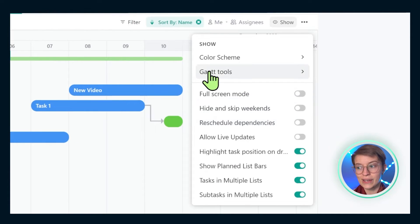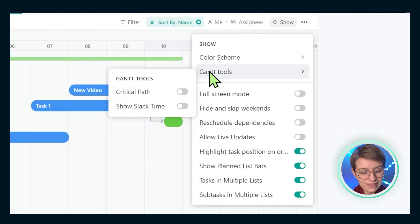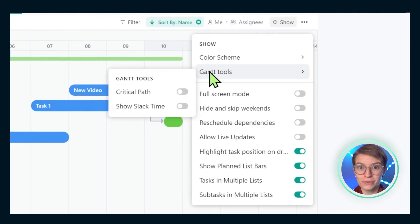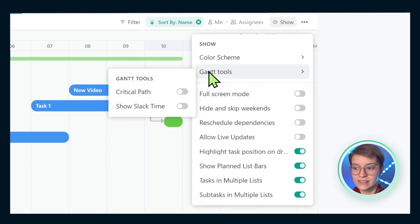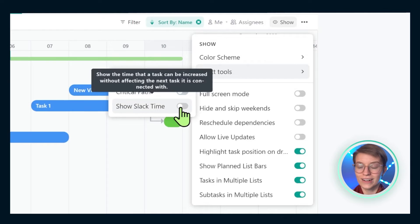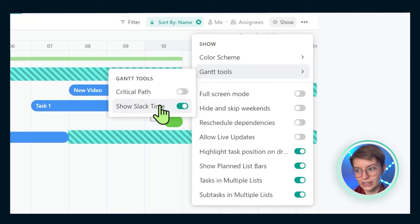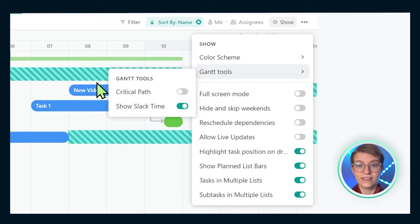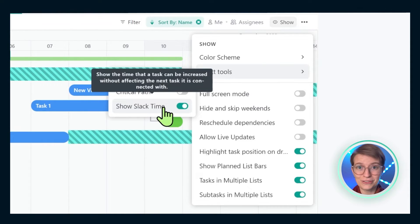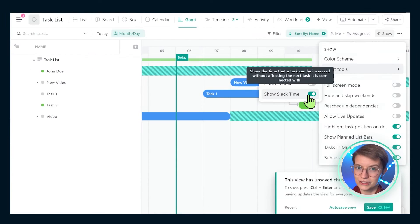In addition, we also have Gantt tools inside the Gantt view. While this is nowhere close to MS Project or other Gantt-heavy software, this does allow us to see things like critical path — the path to achieve a result, what we need to focus on — and our slack time, basically the buffer we have in a given project. If you use these kinds of Gantt tools, you'd likely find these helpful despite them being more basic than what you might be used to.